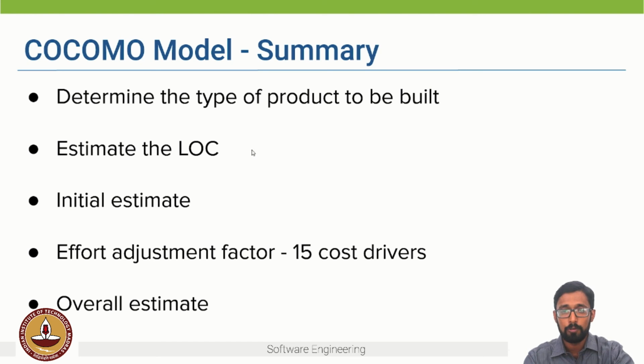If you have noticed, one important thing to note is that the overall estimate depends on the estimation of the lines of code for each module, right? And so it is important to get as much detail about the software, and we should also be aware of our biases when estimating the size of various components.